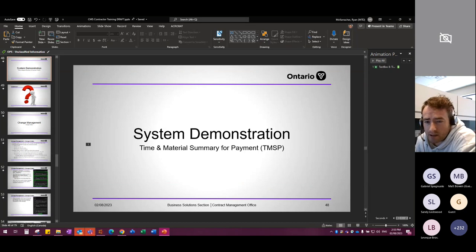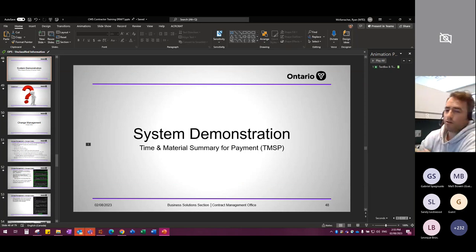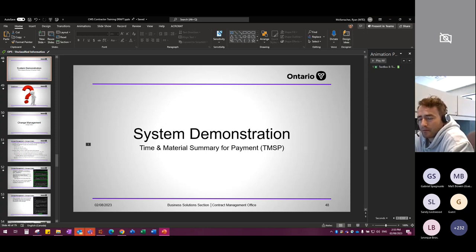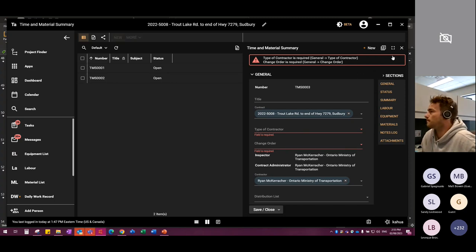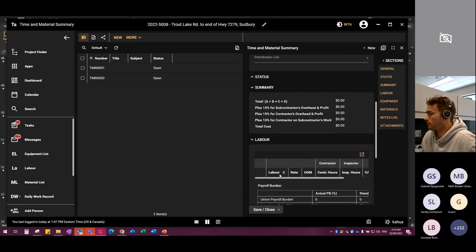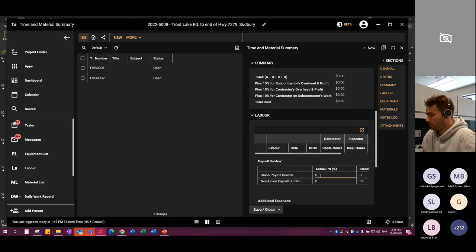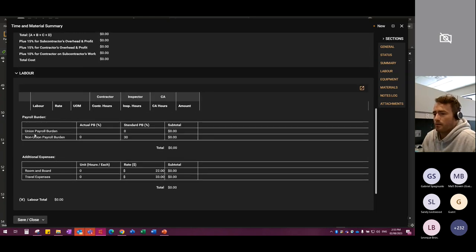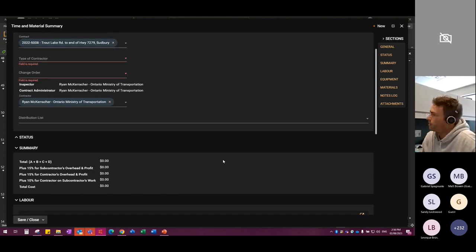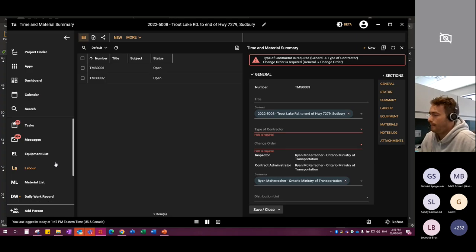Q&A on TMSPs: How do you create a T&M summary with both prime and sub together? You don't — create two separate TMSPs, one for prime and one for sub. There's an unlimited number of TMSP-to-change-order links. Payroll burden is entered in the TMSP: click Save, it generates the output which looks like the old TMSP Excel sheet, and you input your actual payroll burden — for example, 80% — ensuring you have your Ministry of Finance letter and CTF submitted to the CA.